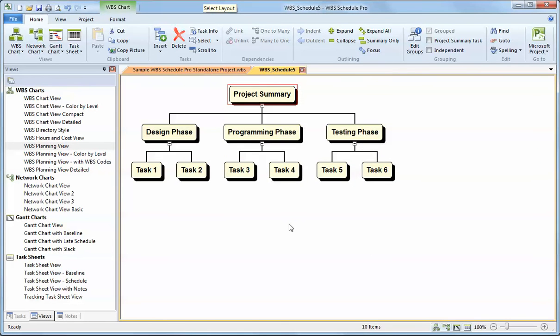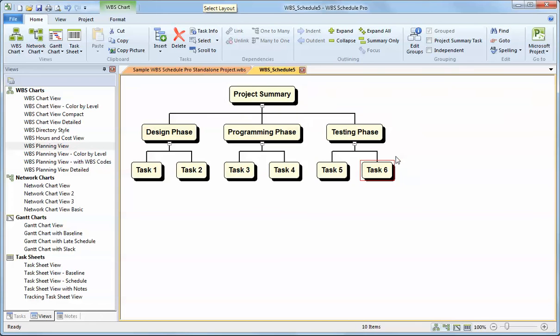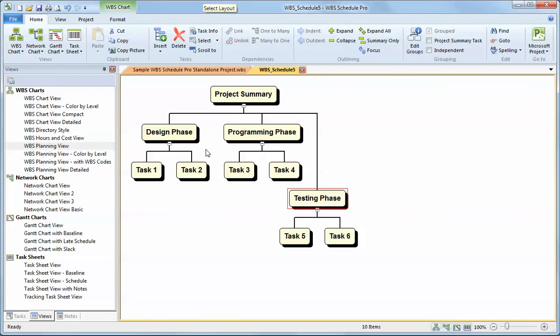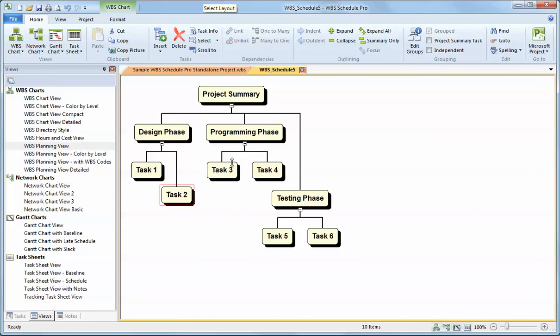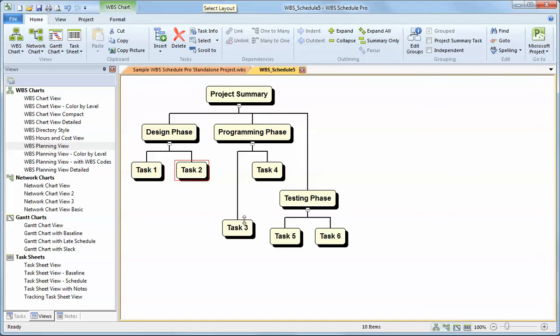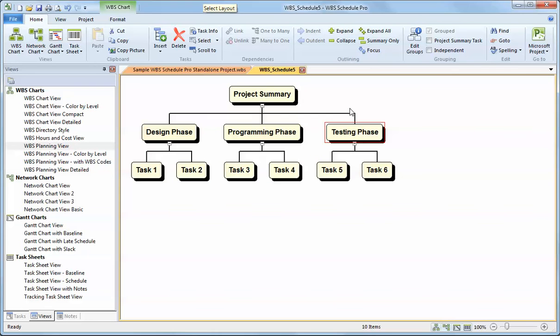It's 80 hours, 40 hours for each. And then all the way to the top project summary would roll up everything from all the subordinates below it. A couple of additional items about working with a WBS. We saw how you can click and drag to move things around. You just click, drag, and move a task around based on where you position it relative to another task. You can also click and drag and move boxes around without changing the structure. This is more or less just repositioning it on the screen.